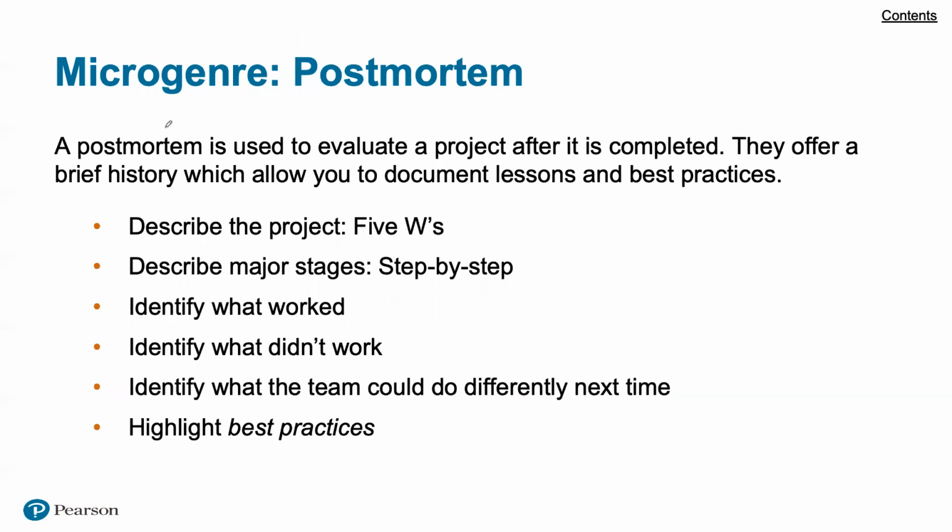Here is a micro genre that's related to this, and it's something that's called a post-mortem. There's various names that are used for this. And so this is how you look to evaluate a project after it is completed. And so here you want to be thinking of the lessons learned, and that would be another way of titling this. So they offer a brief history, which allows you to document lessons and best practices.